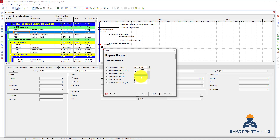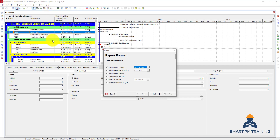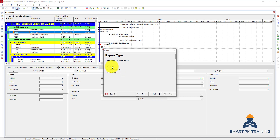You can always export up to the version you have installed on your desktop. I am exporting the current schedule — the schedule update we did — and it has a baseline assigned. Note that when you export the XER file, you do not export the assigned baseline as well; you only export the file you are working on, which is the schedule update of 15th August 2021. Click Next — you want to export the whole project with everything, which is probably what you want to do all the time.